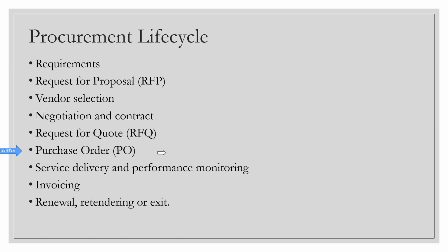Again, you have to take the help of a SME there. Do we really need this? And they will say yes, no. And then you vet the code, you cut it short, or you ask the vendor a few questions, and then you ensure that this is what the code is about. And then you generate the purchase order.